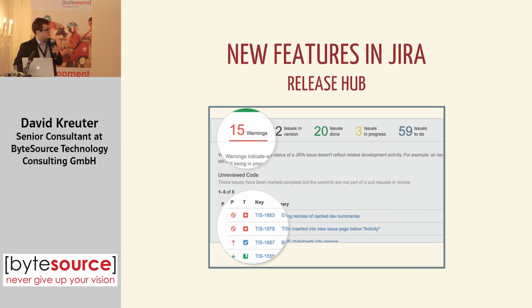What are the new features in Jira? If you have already upgraded, you know this Release Hub. Release Hub is a very high-level view on the current project, on a project status. So you don't need to dig through all your issues to get the status. You get it on a high level, so you see which issues are open, closed, and whether you can really match the release date as specified.